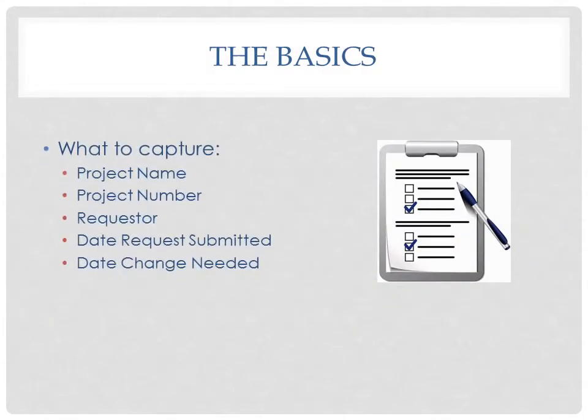Basic information will include the name and/or number of the project, the name of the individual or team making the request, the date the request was submitted for consideration, and the date the change is needed. Indicate whether that's a required date or a target date.